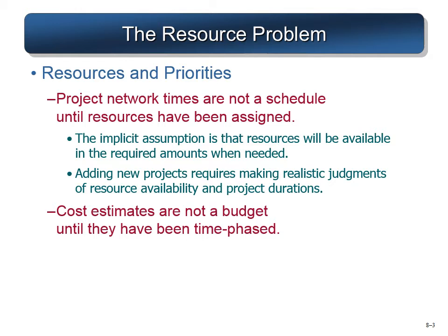So that's why it is said that you cannot really make a budget in its true sense unless it is time phased, unless you do it based on a network. So these two are very much interlinked: the time network and the cost and the resource available.